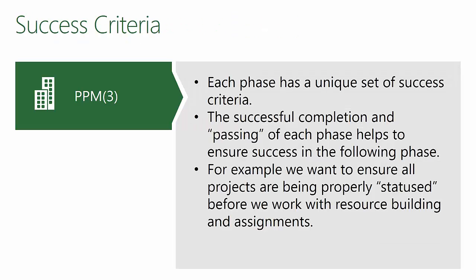The notion of success criteria is essentially that each phase has a unique set of success criteria in order to move to the next phase. For example, when looking at the project management phase, we want to make sure that all projects are properly statused before moving to the next phase — this is a critical part of working with Project Online and Project Server.